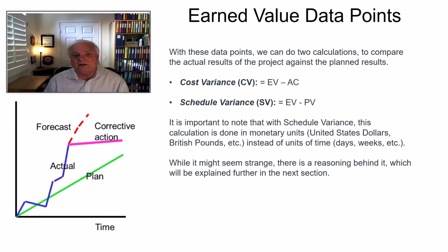In a project, before you can start, you had to create some level of understanding of what your cost was going to be. So you had a budget that you started with, and you had a schedule that you started with. And that schedule was roughly how long you thought it was going to take. And progressively what you've done is you've decomposed that information into the scope statement, translated it into the WBS structure. From the WBS structure, you've then loaded that into Microsoft Project. And inside Microsoft Project, you're actually calculating and measuring this on a daily basis if you need to.